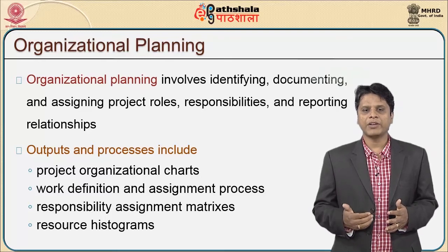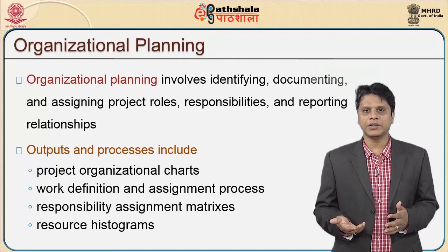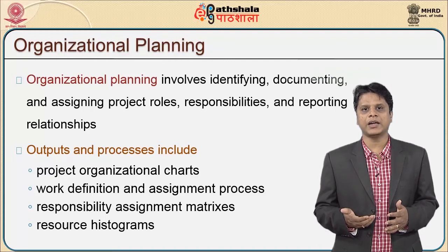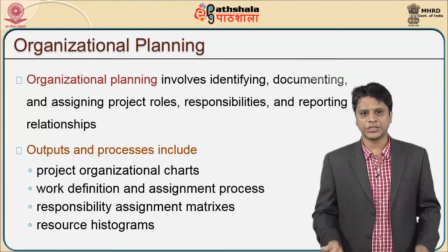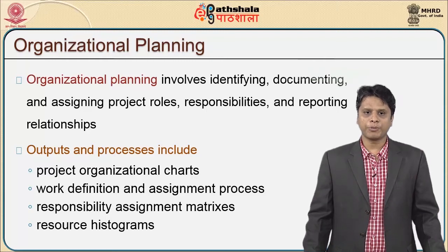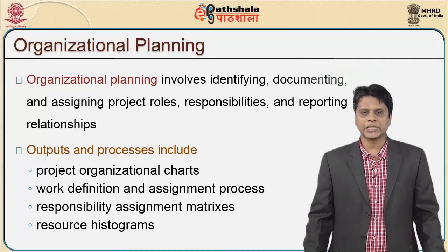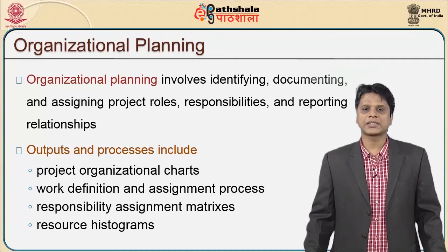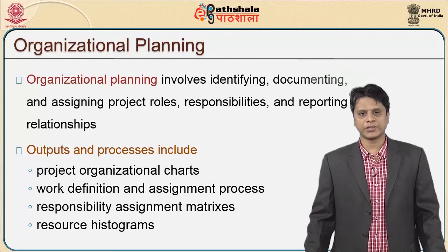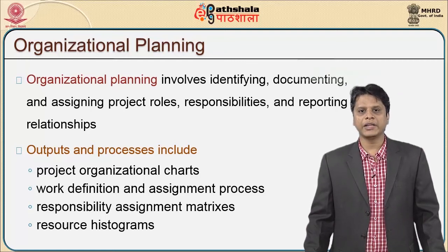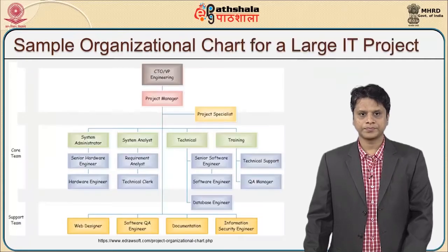So whenever I am planning this for an organization, every project needs to understand the roles, responsibilities and the reporting relationships of it. The outputs and process of organizational planning include the project's organizational chart, work definition and assignment process, responsibility assignment matrices and resource histograms.